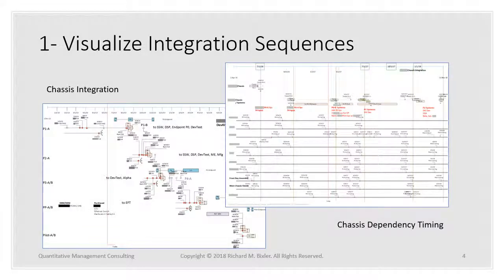A timeline is shown for each assembly element in the integration, showing milestones for availability into integrations. Then integration steps are shown as bars at the top for chassis and systems based on incremental build steps. Key platform test iterations that gate builds are also shown.